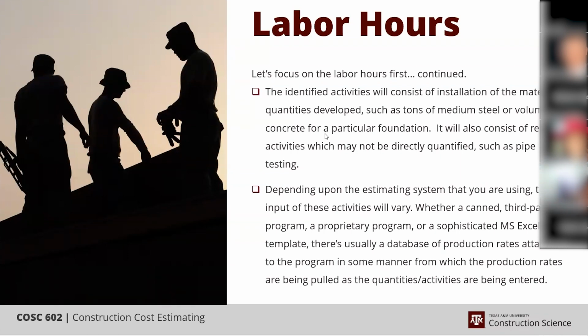But all those programs, when you receive them, they're somewhat like Excel in that it's blank. You have to put in what you want. But being third party CAN programs, they have all the math and the structure built into it. You just have to put in the data and create the database for it to pick from. That can be quite a bit of effort. But when you're done, you may have hundreds or thousands or tens of thousands of activities. So when you type in a code and it brings up the material quantity you're wanting to install, it'll pull that rate in.